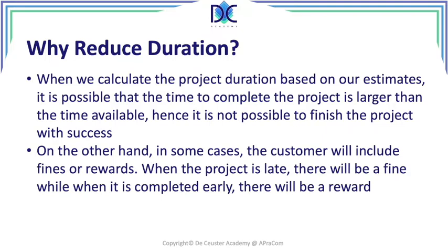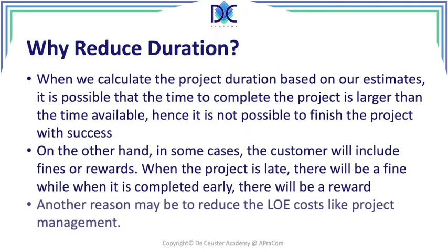What can we do? Is it interesting to reduce the duration? Do we have to reduce the duration because we want to avoid fines? Or will we reduce the duration because we can reduce the total cost and in some cases even get some additional bonuses? Another parameter is the level of effort cost of the project, which is typically the project management. Project management is always on time.